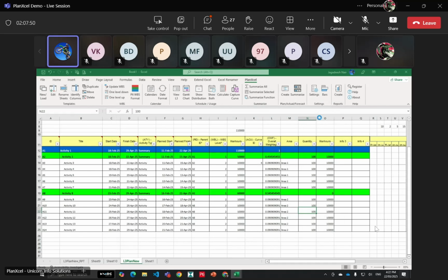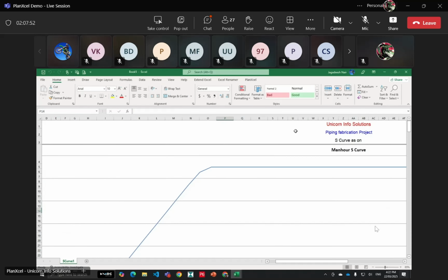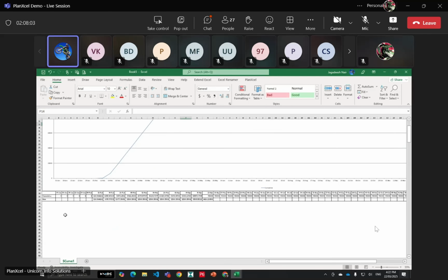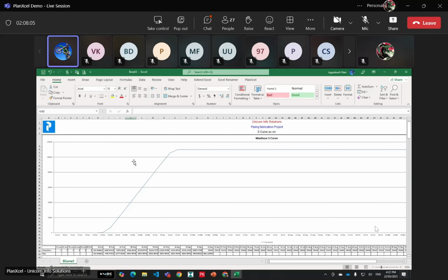We'll go for view report. Yeah, the S-curve is now created. So this S-curve is the one that can be used for any monitoring at a later stage. When we want to have the actuals, we can also calculate the actuals and then plot it against it. And then we'll give a plan versus the actuals S-curve, the early plan and the early one. Similarly,